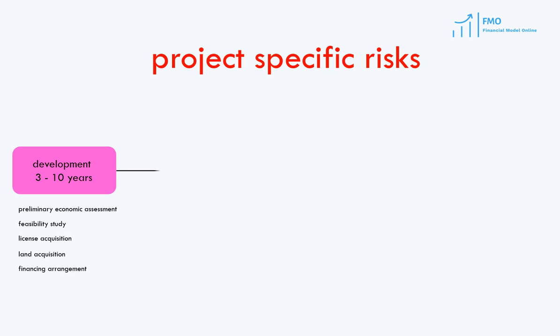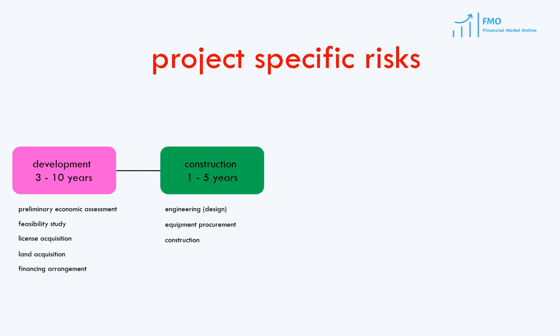Next is the stage when financing is closed and construction starts. At the construction stage, an EPC contractor designs the project, procures necessary equipment and materials, and builds the project according to the specifications set by the project sponsors. This stage lasts anywhere from one to five years, dependent on how complex the project is.